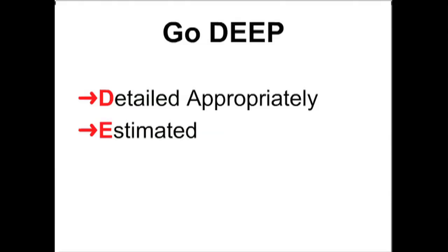So I can take an estimated backlog and say, well, I have another 2 sprints left. I want to have a release then. I have a capacity of past velocity of 30 points. So obviously I can do 60 points worth of work. And that will allow you to estimate what you can do when. So it's a very important point for both prioritization and also management for release scheduling.